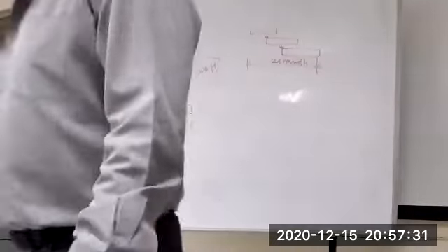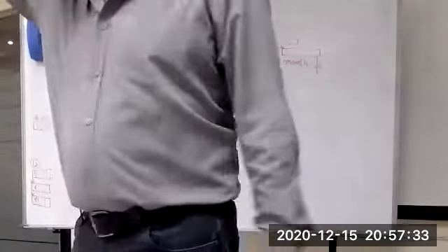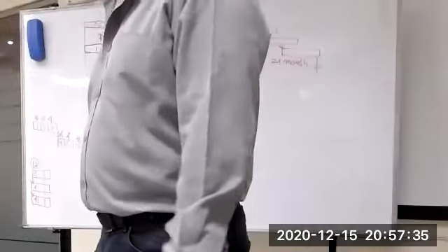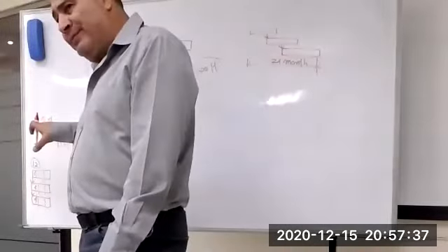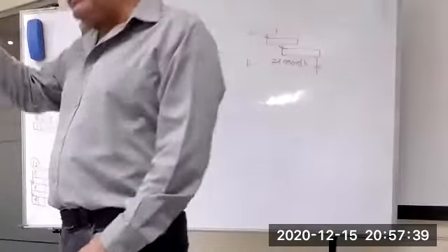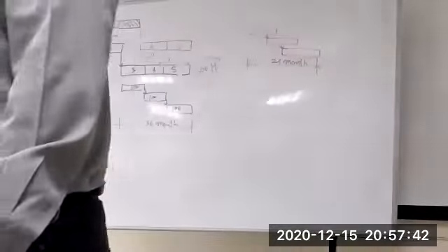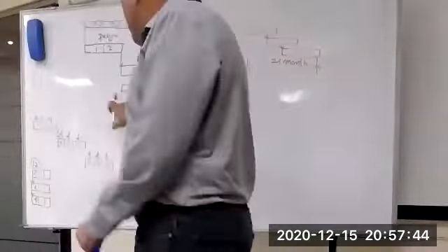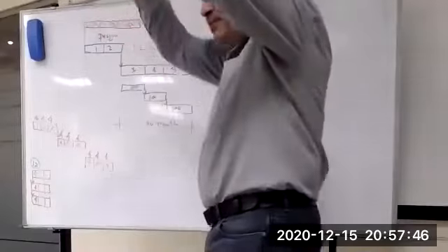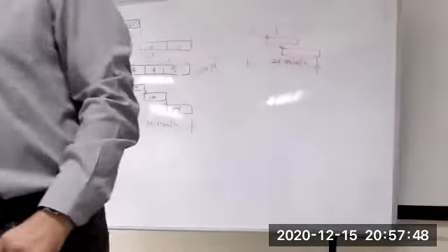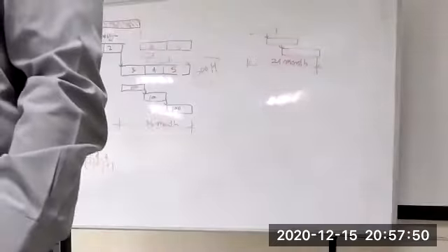Assume you need it in 1 day. In 1 day, you have to provide the 12. Okay, so assume you have only 4 in your hand. Outsourcing 8, it will cost you more or not? You have crashing always. If you have updated your program and you found yourself 1 week behind schedule, and